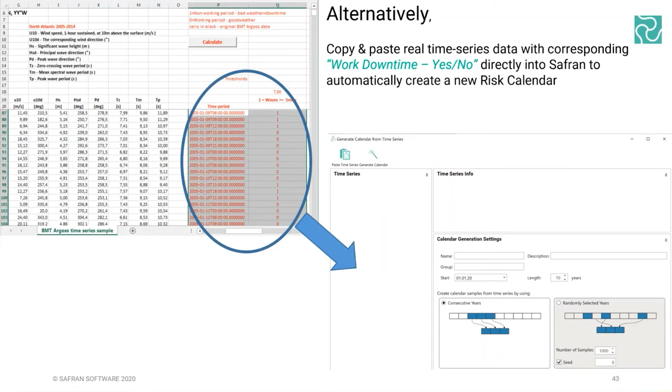You actually find this under the sample data, which I mentioned at the very start, from the burger menu. Go to open the log file folder. We've got some sample data there, some sample projects. This spreadsheet's in there. What you can do with this is, if you've got the actual real life telemetry from a weather station, for instance, wave height, wind speed, and these kinds of things, just add a column and put in a formula that says if greater than X, then 1, if not, then 0. And that simple logic 1, logic 0 is enough information.